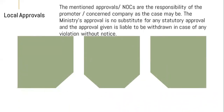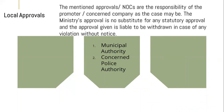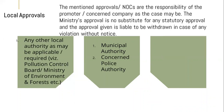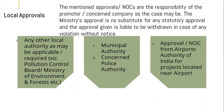The application also needs to address local approvals. The mentioned approvals or NOCs are the responsibility of the promoter or the concerned company. The Ministry's approval is no substitute for any statutory approval, and approval can be withdrawn in case of violation. Local approvals are to be given by municipal authority, police authority, and any other local authority as applicable — for example, the Pollution Control Board, Ministry of Environment and Forest, or NOC from the Airport Authority of India for projects located near an airport.